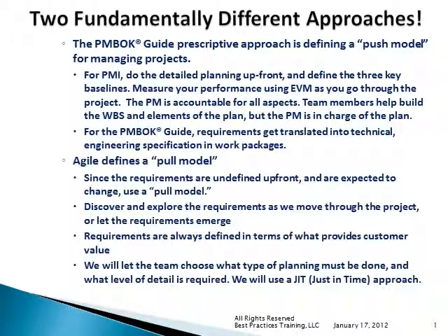And for Agile, we'll use it where we don't know what we want up front, or we know that the requirements will be changing very quickly. There will be a lot of volatility with these requirements, and we need to discover them, explore them. So don't try to define everything in detail up front. Allow the team to pull these requirements as they go through the project in the different iterations.